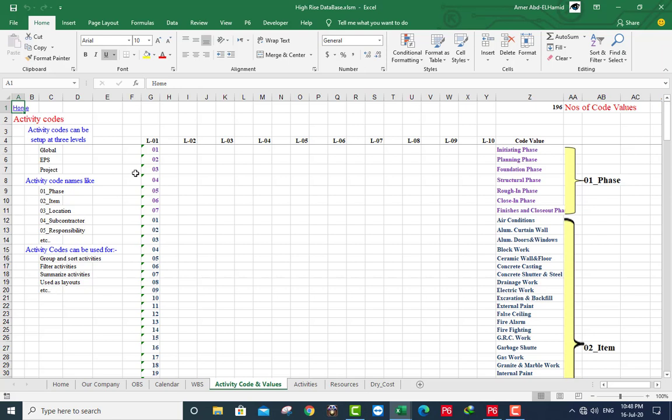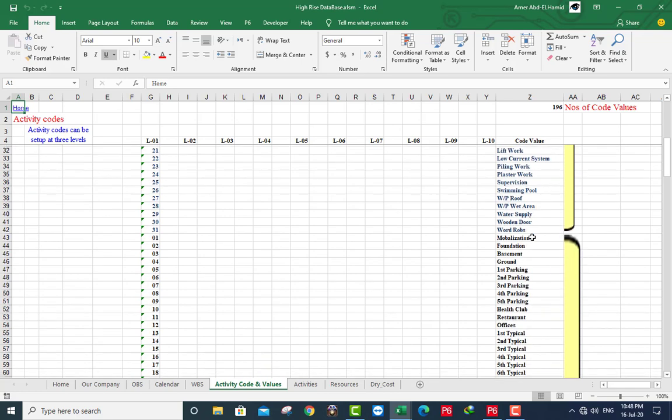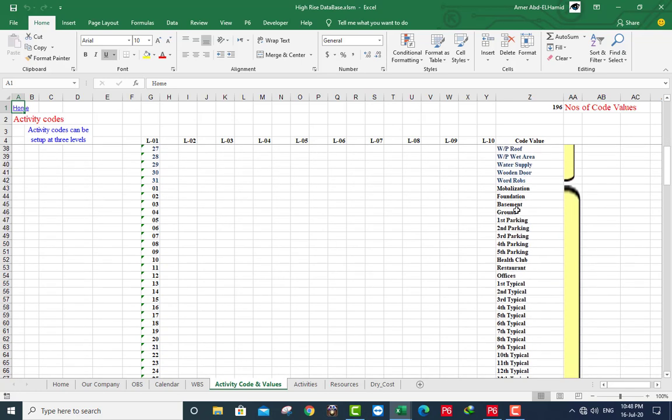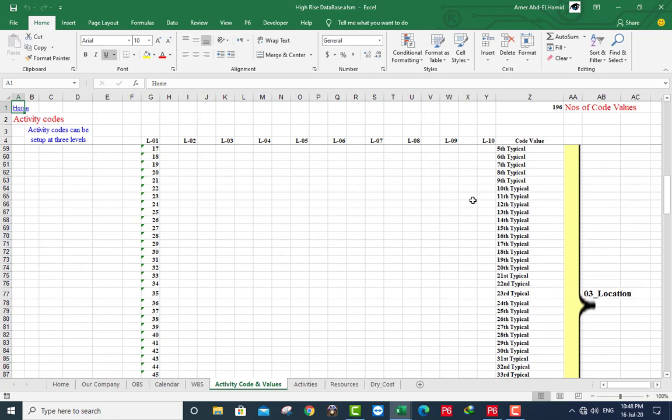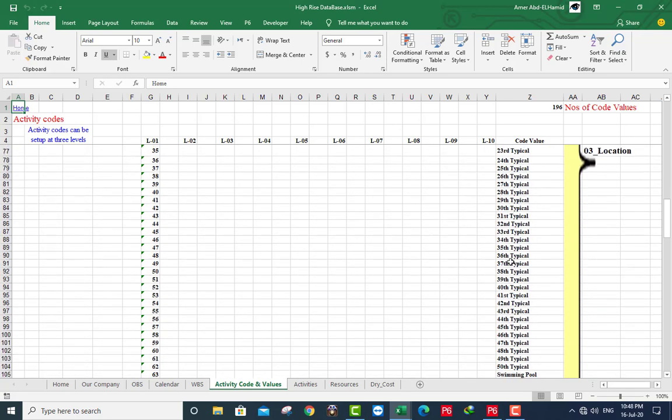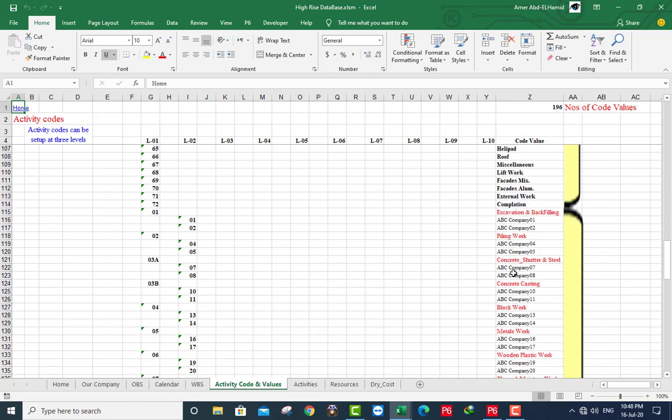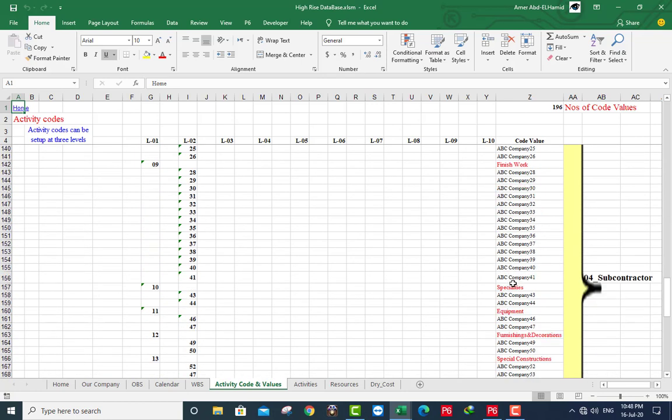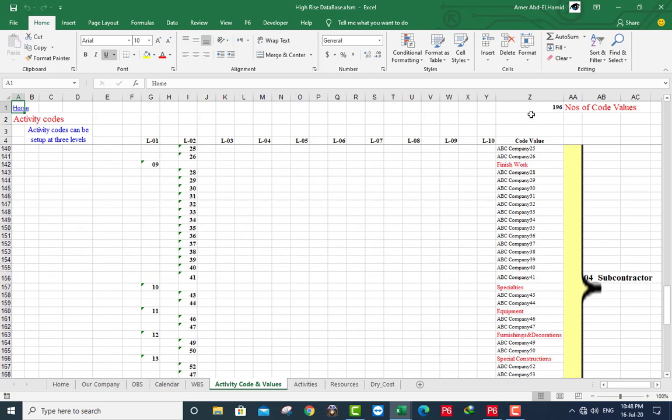Here phase and this code name and this is the value. Here item, this is the value also. Here is the location, this is the value of location. And there is subcontractor and the value of subcontractor.